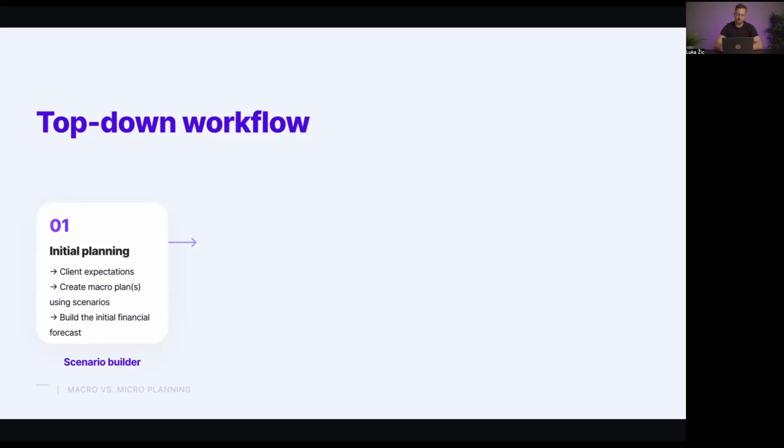That's our first stage. The second stage here is to progress our deal. So at some point in time, once the deal is mature enough, we will want to push it into actual resourcing using tentative bookings. This way we communicate to the entire company, to everybody who's relevant to the whole process, hey, we have something in the pipeline here that might come through. So we're using tentative bookings here.